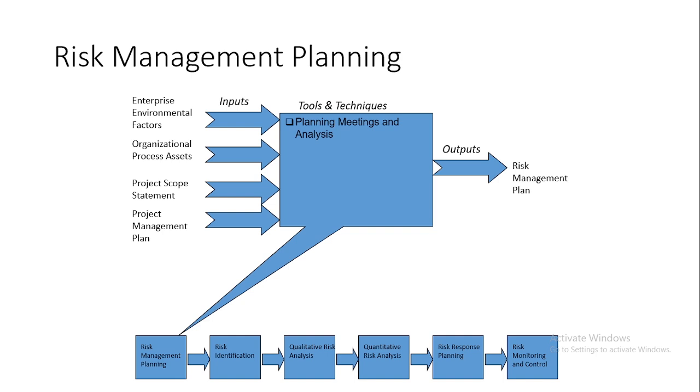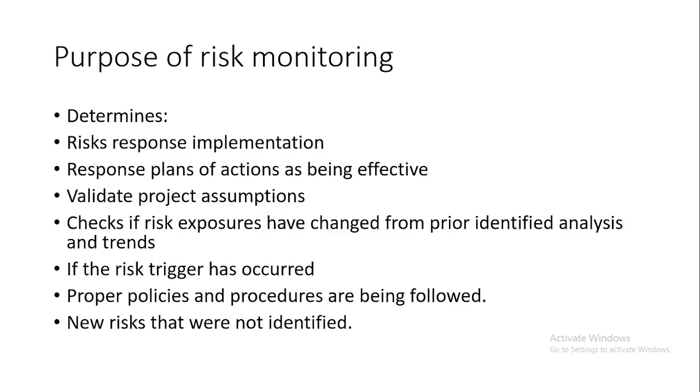First, you start with the risk identification. Then you analyze the risk, that is the qualitative risk analysis, and then you do the quantitative risk analysis. Qualitative, these are just contexts and texts. Quantitative, this is in terms of numbers or budgets. Then you do your risk response planning, and you plan for these risks, how you're going to respond to them, the action plan, the strategies you put in place, and then after you do your risk monitoring and control.